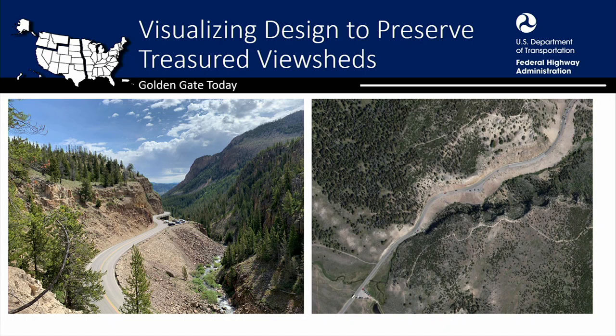And aerial view, you can see going through the canyon. So we have a project to widen the road and rebuild the road, bring it up to current standards through Golden Gate. Existing road is about 22 feet wide. We're gonna widen it up to 30 feet. We've got rockfall issues here, so we wanna put a rockfall ditch in, so that we have less rockfall on the road. There was a rock that landed on the viaduct 2 weeks ago and put a hole in the deck. So we want to avoid that.